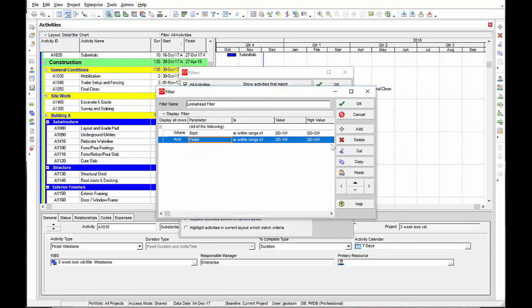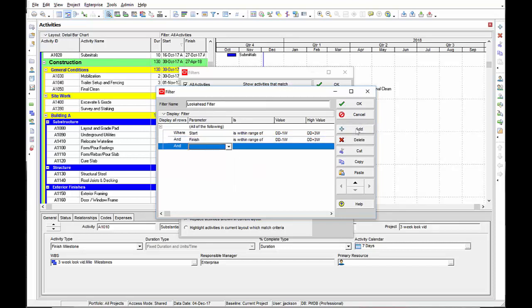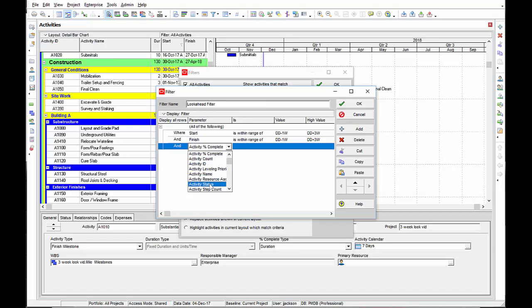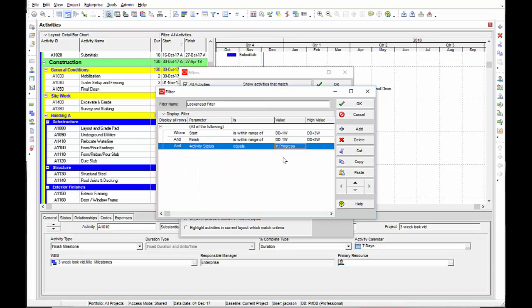The third parameter that I want to select I select by selecting add and then I want any activity that has a status so I select activity status equals in progress. This parameter will select any activity that may have started prior to this selected window and is finishing after the selected window. So the start and finish date are not within this range but they are currently ongoing.